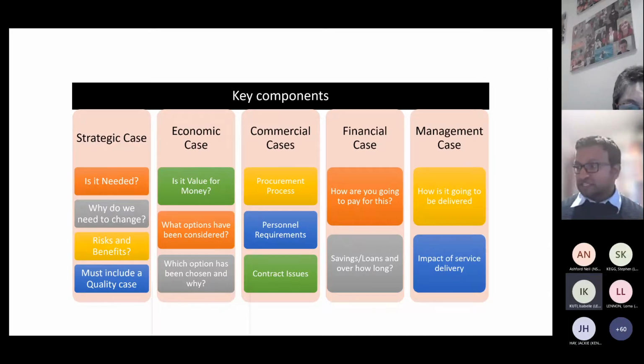And it meant that there was actually 8 weeks where the piece of kit was completely useless because we had to replace the hardware, and then had software issues and all that kind of stuff. So be aware of what existing contract arrangements there are.